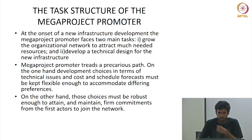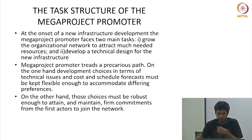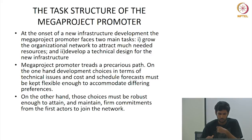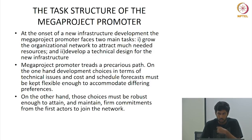The task structure of the mega project promoter is at the onset of new infrastructure development. The mega project promoter has two main tasks: first, grow the organizational network to attract much-needed resources; and second, develop the technical design of the new infrastructure. Mega project promoters face a trade-off where development choices in terms of technical issues, cost, and schedule forecasts must be kept flexible enough to accommodate different preferences, yet robust enough to attain and maintain firm commitments from the first actors to join the network.